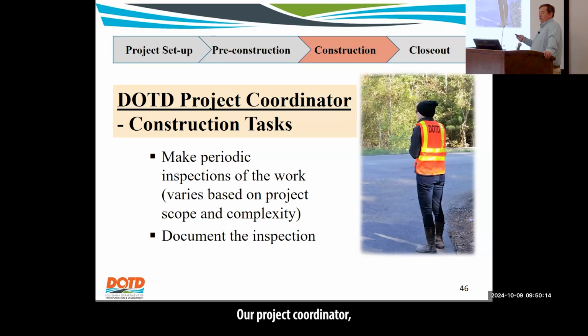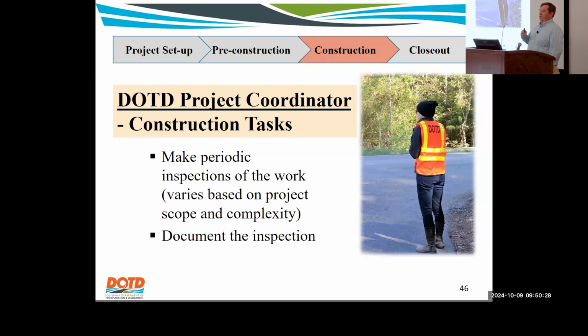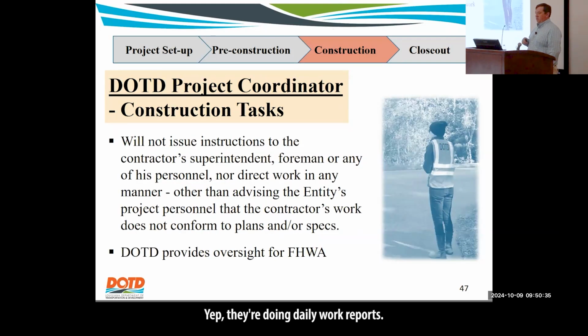Our project coordinator, their task is to make periodic inspections of the work. So they're not going to be out there every day. They're just going to check on it every so often, maybe drive through, make sure traffic control is upright. Yep, they're moving the project along, that sort of thing. They'll back check your documentation, making sure, yep, they're doing daily work reports. Yes, the estimates are being processed. Yes, change orders are being processed. That's kind of their responsibility.